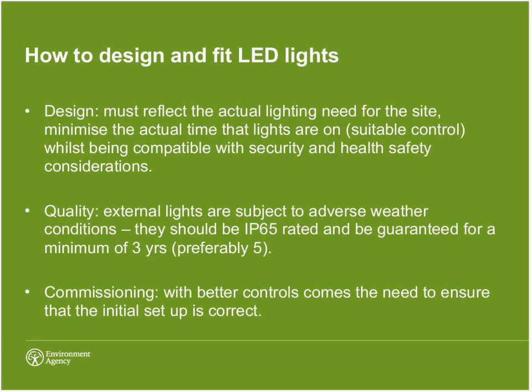The other one was commissioning. We've talked about the controls and setting lux levels. It's commissioning, and it applies across a broad range of energy initiatives, from BMS systems etc. Commissioning is always something that really gets squeezed, and it annoys me that it gets squeezed because it's so important. It's always overlooked, it seems. Failure to commission correctly is a real missed opportunity, but it also creates, for building managers, a real legacy of problems that eventually have to be addressed.